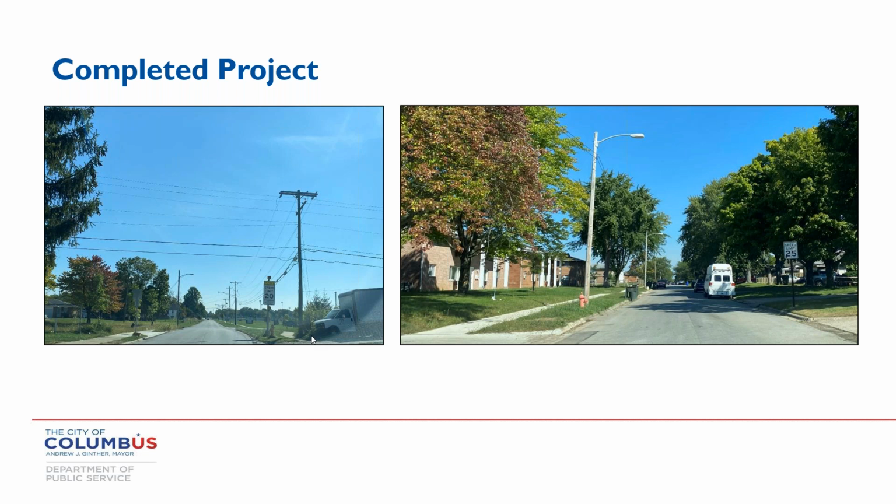So we look for network impact. We look at high use, but we also really look at constructability. Because again, you have a limited amount of money for Safe Routes, and if you go over the $400,000, now $500,000, you need to be able to come up with the funding locally or with partners. That's another reason why we look for high impact projects, because if you have overruns, it makes it easier to persuade the masters of the purse to actually give a little bit more money.